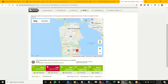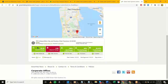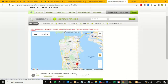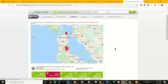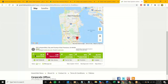The next thing to highlight is the color modules: green is good, red is essentially bad, gray is neutral. Some projects in the active section haven't done any reporting yet — no tickets uploaded — so they're just gray and that's fine. But if you see green it means the recovery rate is above the required 65%. One module will always be red because it's tracking disposed tonnage, but the main module showing green means it's above the 65% requirement. If it were at 64% or 30%, that module would be red.